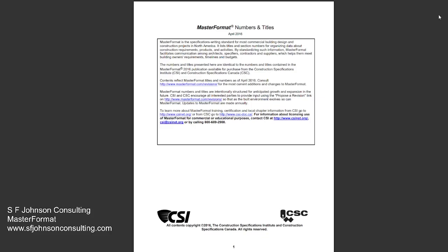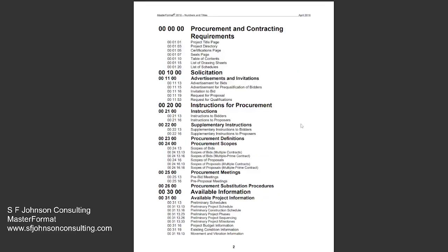And so if you have to think about the construction documents, you would think in this way. The construction documents are pretty much the written words that go with the pictures. And so every time you see a picture, you're going to have something related to that picture in the specifications. They're ordered in a sequence of three component two-digit numbers. And all of the zeros are pretty much paperwork, submittal information, scope of work, all of that type of information.